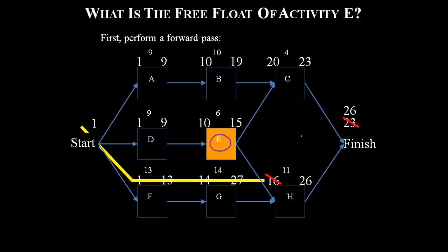Okay, so now if you see here, we are on the forward pass. From here 15 came and from here 27 came. When we do the forward pass, the number which is larger would go, so we would start on next day or 27, which is 28. Similarly 28, again 28 plus 11 minus 1, it's 38. So from here 38 would go now, so which is the next day, sorry, 38.